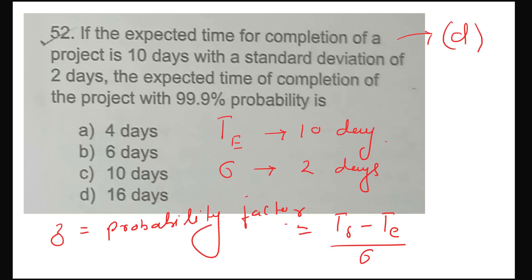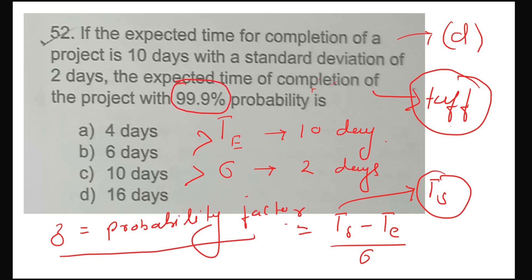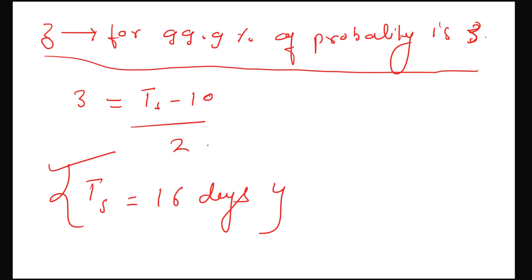Question 52 is a hard question — this numerical is tough. Such numericals are rarely asked. The data given includes expected completion time, standard deviation, and scheduled completion time. We need to find the value of ts. Corresponding to a probability of completion of 99.9%, the probability factor value will be 3. So: 3 = (ts − 10) / 2, which gives ts = 16 days. So option number D will be correct for question 52.